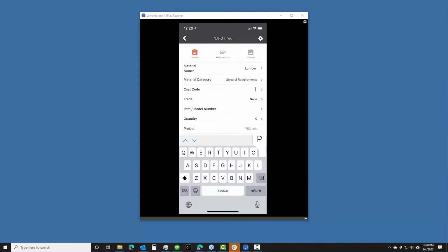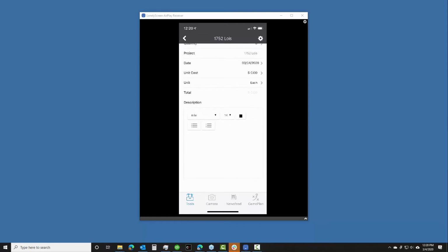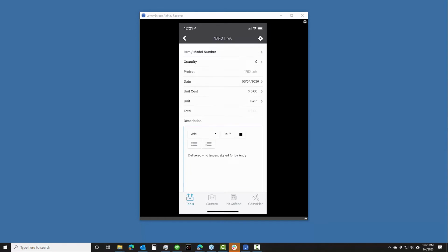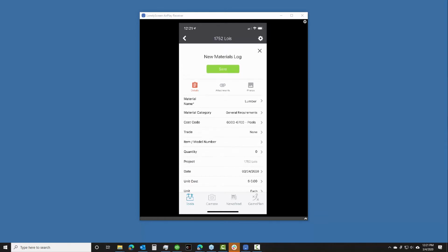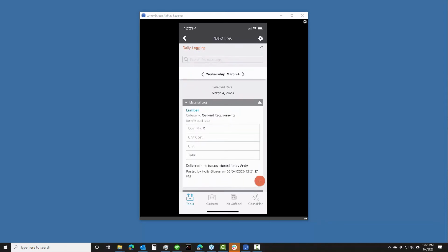Yeah, and kind of thinking back to the way that it used to be done, or the way that people typically had posted logs or written logs down in a logbook. I mean, they would wait to the end of the day because they had to write it down. So they had to stop, pull out a notebook, write out the information. It's a lot faster, like you were saying, Holly, to just get the information in now. It doesn't have to be perfect. The important component here is that it is being documented, right? That you do have a record of what's happening on site, whether it's good or bad. That way you're showing your due diligence, that your company is keeping track of certain items and addressing them in a timely fashion, as opposed to just burying your head in the sand and ignoring any site issues or things that could have been addressed earlier in the process.